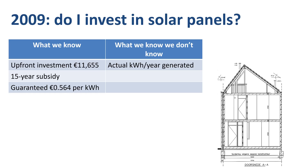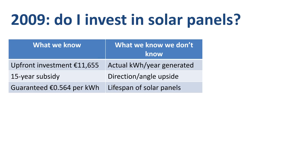My first reason to be optimistic was the structure of my house. The solar panels would be installed on the roof with nearly perfect conditions — facing due south, at a 37-degree angle — so hopefully there would be some upside in the number of kWh generated per year. Additionally, a 15-year lifespan sounded short to me, and every extra year of operation would add positive returns.